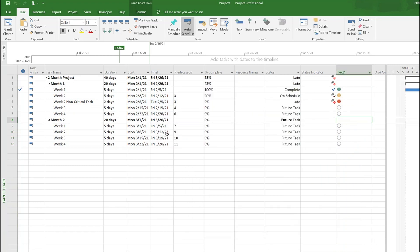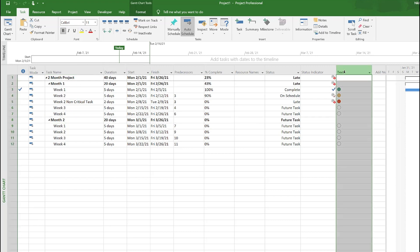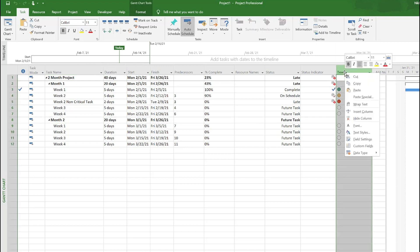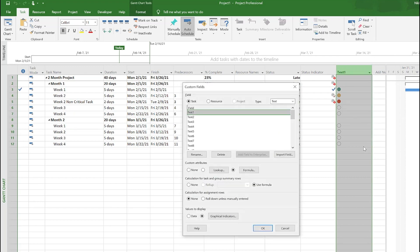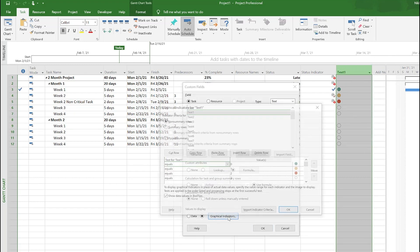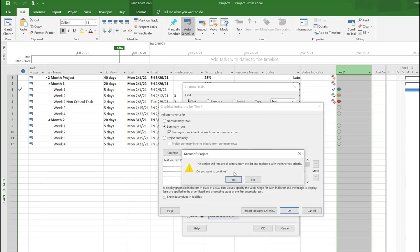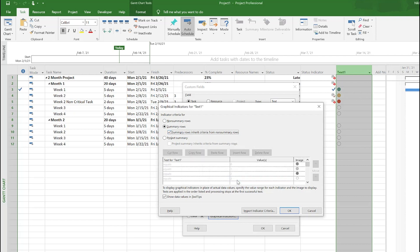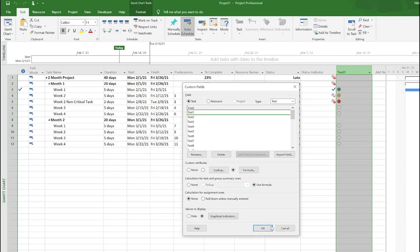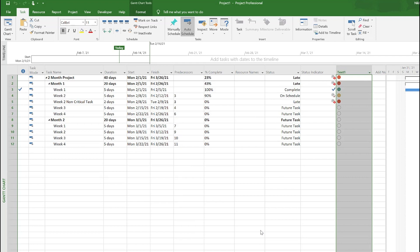Now you would see here it's not taking care of the summary task, so no indicators there. To fix that, right-click, custom fields, go to graphical indicators, and from here just say summary rows inherit the data from non-summary tasks.